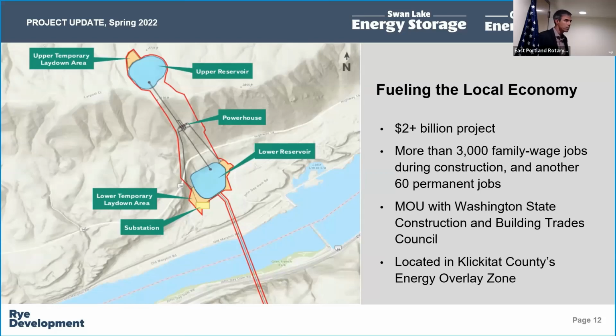And to build 2 60-acre ponds here takes at least 5 years. And in the case of the Southern Oregon project, almost a decade to permit. And the level of public scrutiny, the bar is high, right? So we had public meetings for a series of years in Southern Oregon and also out here in the gorge to get through a list of studies that were suggested by our state and federal resource agencies, the tribes, members